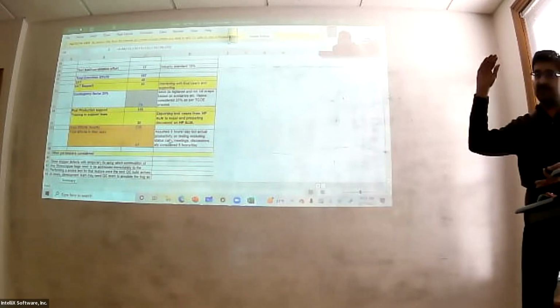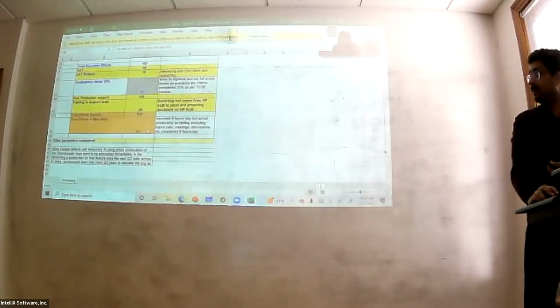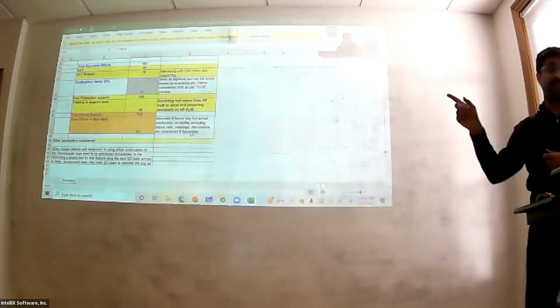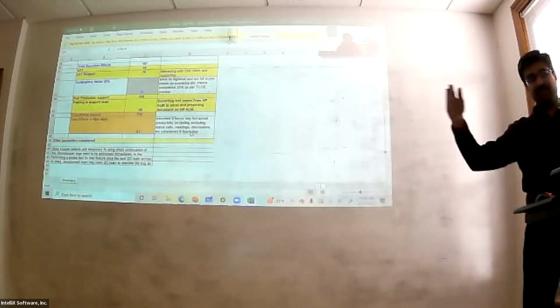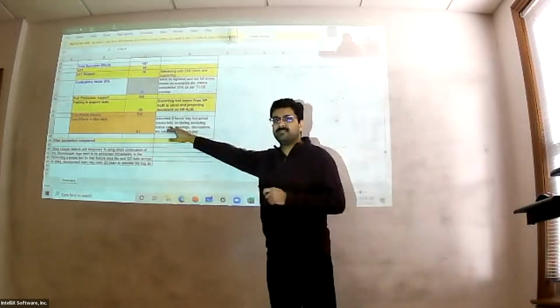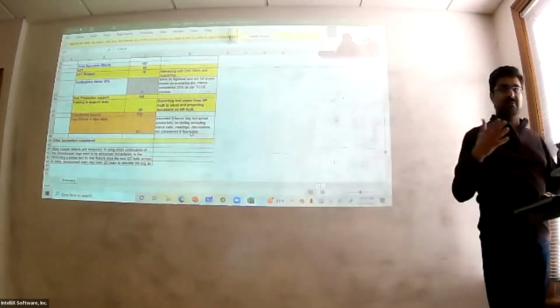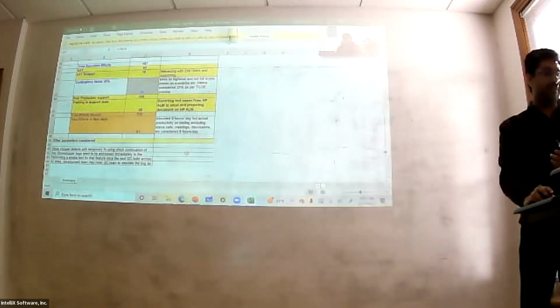This is how many total hours it's going to come to. And to do that, you divide it by 8 to come up with how many days I'm going to take. Now remember, these are days, right? So you can't just say, hey, it's 2 months and a week. No, these are 67 working days, which is usually Monday to Friday. So you figure that out, right? It requires about 13.5 weeks for me to do that. So it's going to take me about 3 months to do the testing, end to end, involving all those activities. That's how you give the rough estimate.